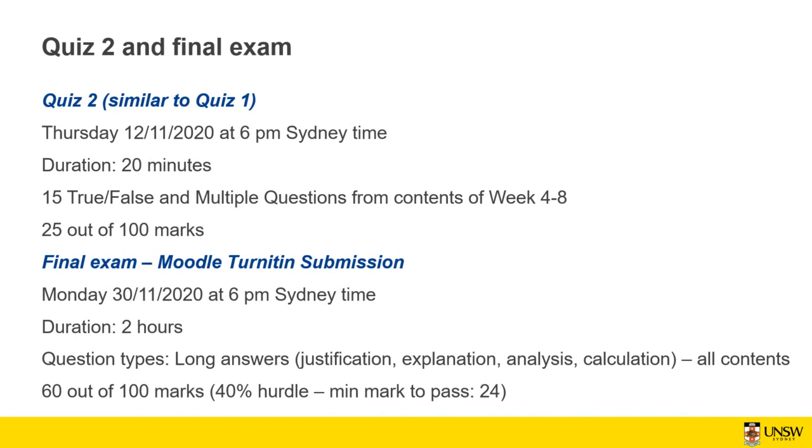renovating the bathroom in the first 4 months at 30K. So this is 30K planned value. In the second 4 months, you renovate the kitchen with 40K, and this is the planned value. And then in the last 4 months, you're going to renovate the lounge with another 30K. So the sum of all these is going to be 100,000, which is the budget at completion.